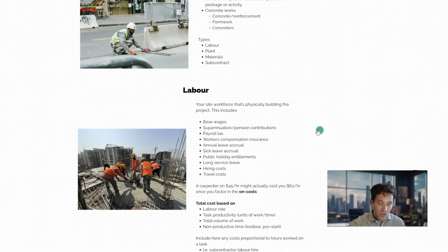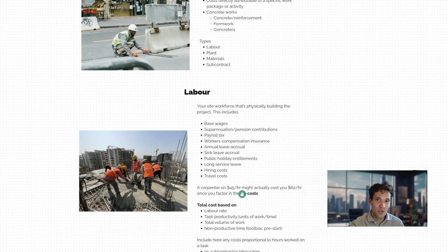And my philosophy with labor costs is you want to track here any costs that are proportional to the total hours worked. So I would include subcontractor labor hire. I would call that a labor cost because to me, while you're not factoring in the base wages and on-costing, you're just paying a fixed cost per unit of time. It's still proportional to the total number of hours worked.